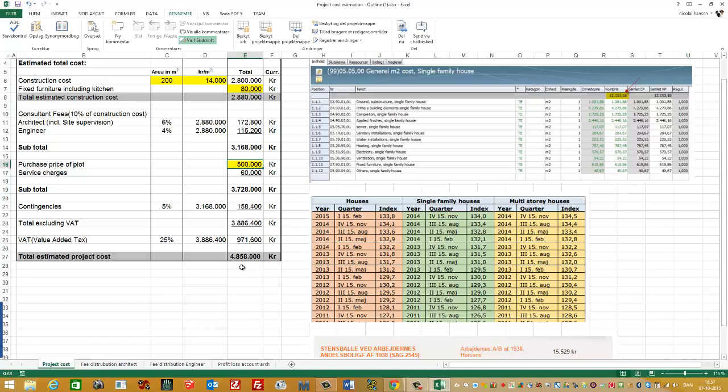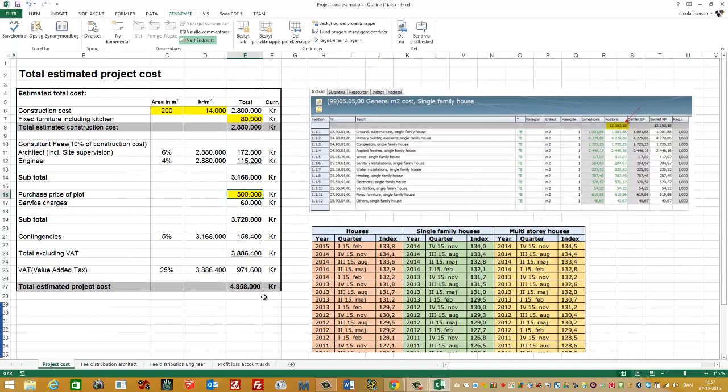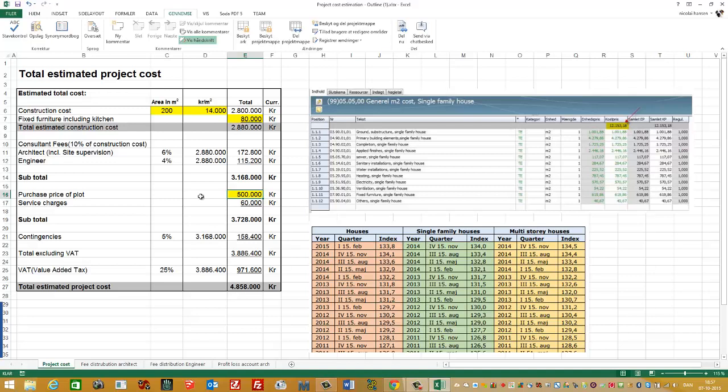So in total, I have here for the total estimated project cost 4.8 million Kroner. Just briefly, how it's split up. You have first of all the construction cost, in this example 2.8 million Kroner. Then I have the fixed furniture and the kitchen, 80,000 Kroner. That gives me a total of 2.88 million Kroner.